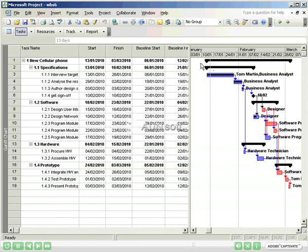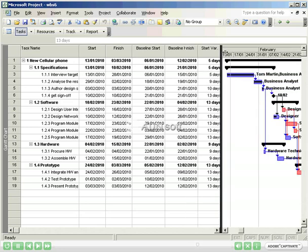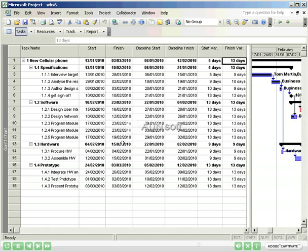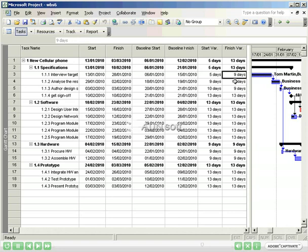We will now be able to see the difference between our estimates and where we actually are in the project. We can see that Interview Target Audience finished 9 days later than expected. Get Sign Off finished 13 days later than expected. We can see so far that the total variance on the project is 13 days.